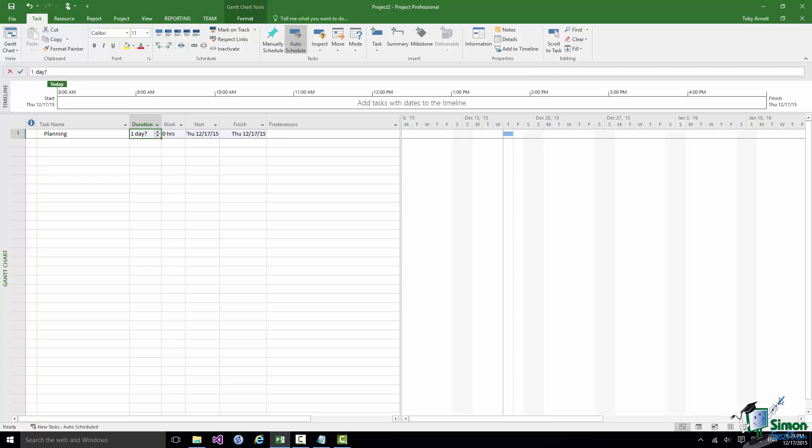One of those fields is the duration. By default a task has a duration of one day with a question mark. The question mark means this is an estimated duration, and normally you leave the duration as an estimate until you have a reasonably reliable figure for that task. At this stage I'm not going to worry about durations at all — I'm just going to get all the tasks in. Those question marks are a good reminder that it's just an estimate. And believe me, planning a wedding is a lot longer than a one-day task.